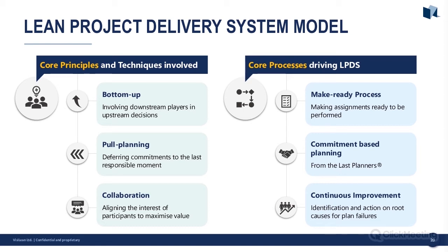And then there's some core processes that really drive this lean project delivery system. The first of which, as I've mentioned briefly, is that make ready process. It sounds obvious, but a week before something's due to start, put a date in their calendar or whatever that they have to make something ready. They have to check that they've got the right materials, the right tools, things like that. Because if they don't have any of those things on that day, then they've got a week to catch up. And it sounds so basic, but it's something that's really underused in construction. If we can start to do that more efficiently, we're going to really start to reduce delays.